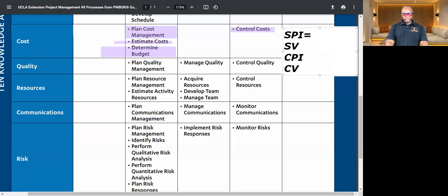So SPI equals earned value divided by planned value. So they have a mnemonic, someone else's problem, SEP. This is subtraction, where we have a schedule variance. It's a subtraction because variances are all about difference. Indices are all about